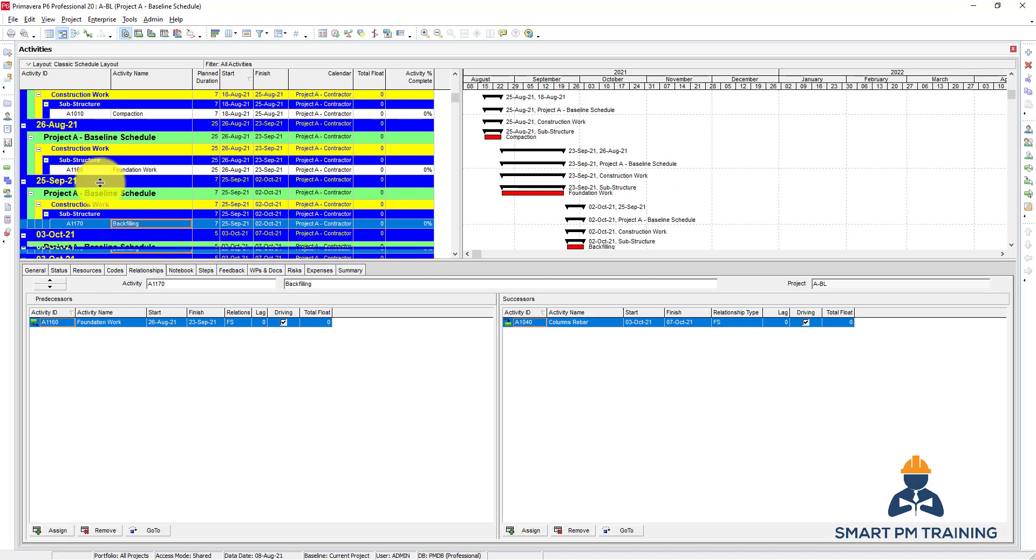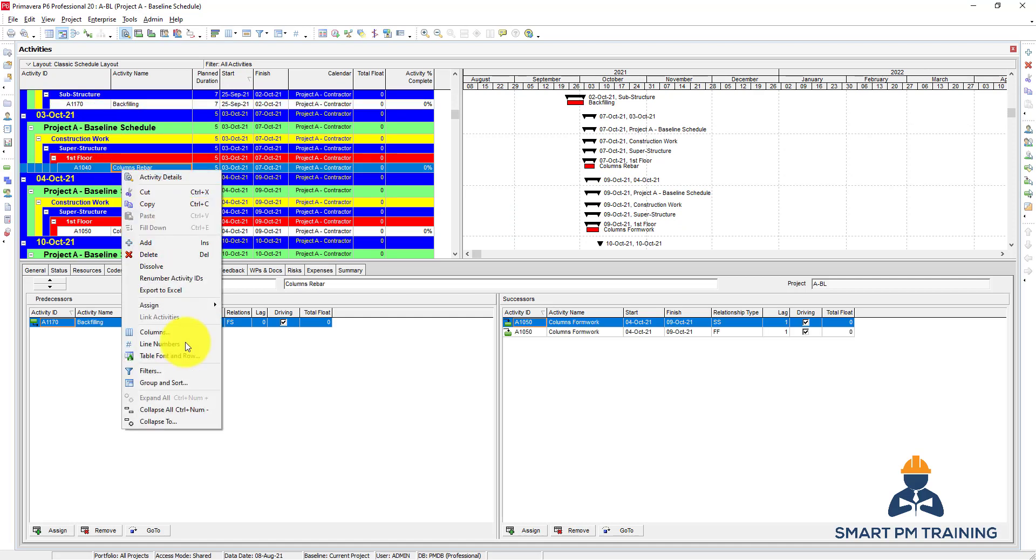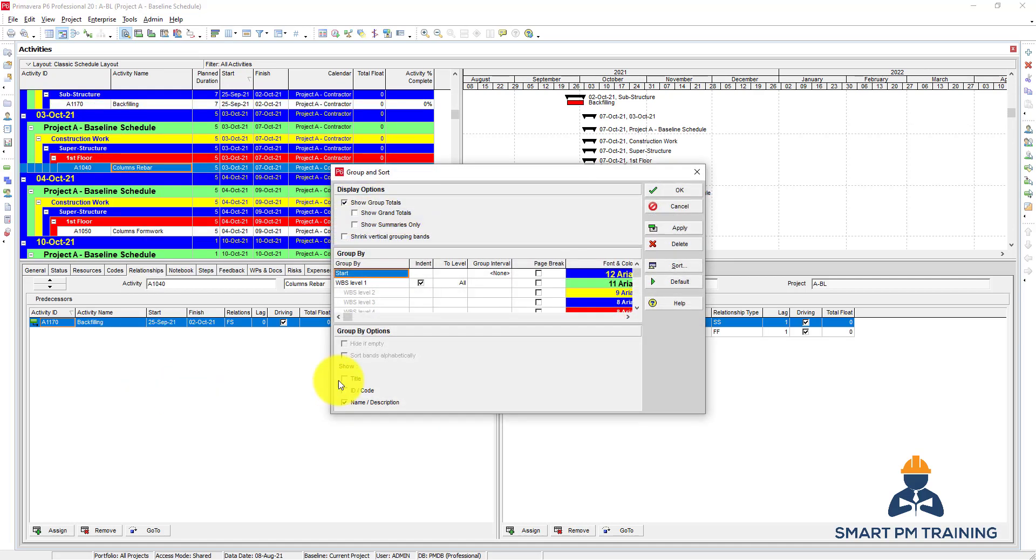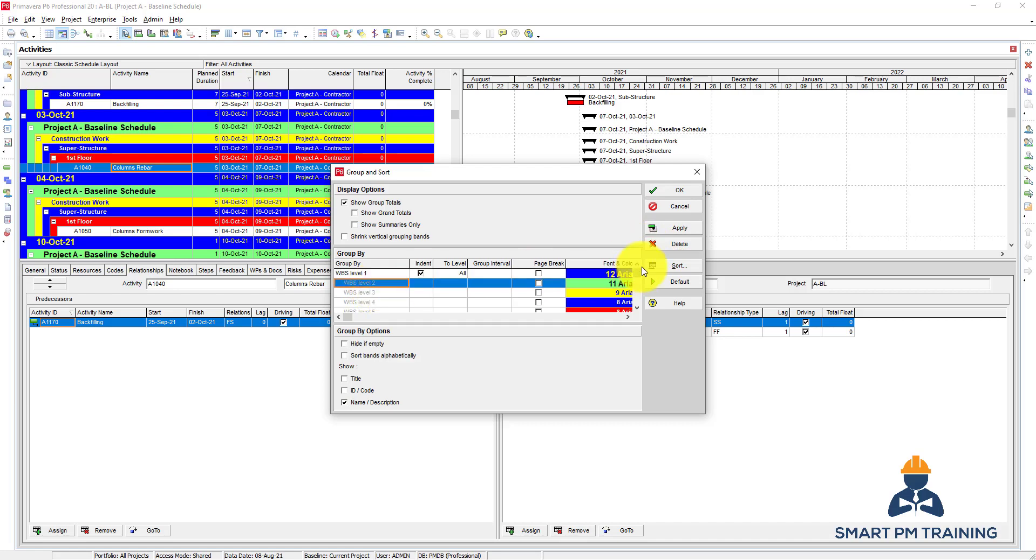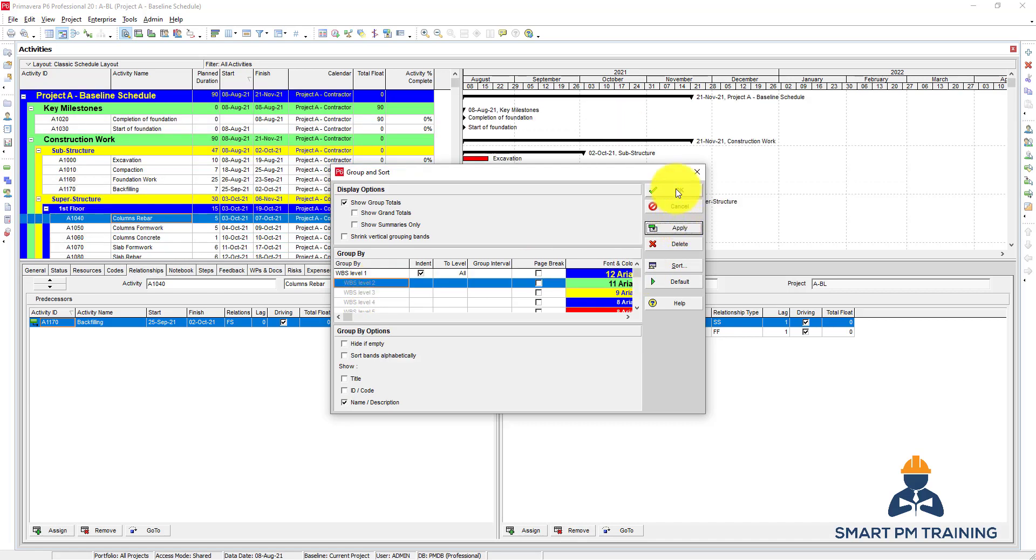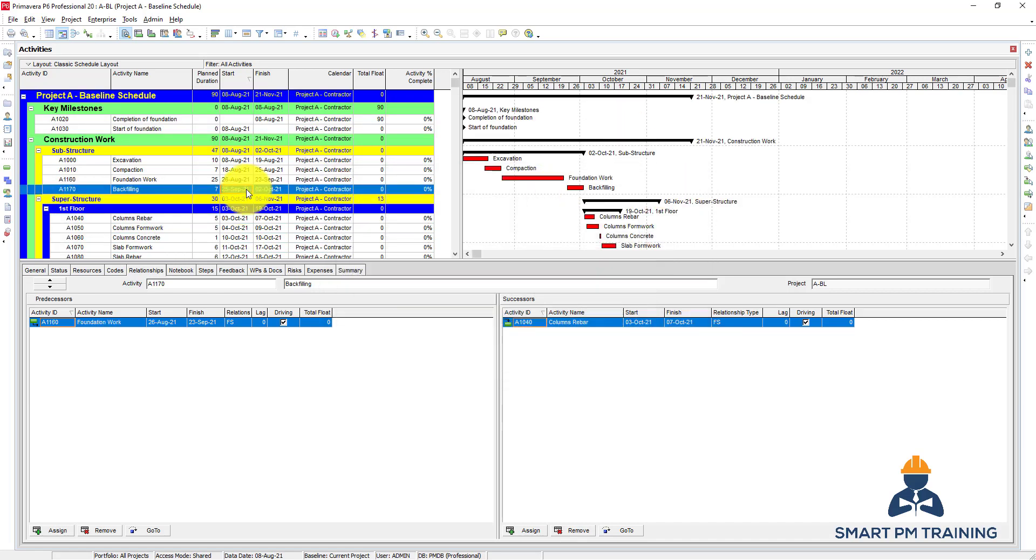So this is maybe a different way of presentation, but you can have different levels of grouping. You can also delete and add. If I don't want the start anymore, you can click delete from here or maybe delete from the keyboard as well. Click apply. This is how you group the activities. In the next lecture we will talk about filters.